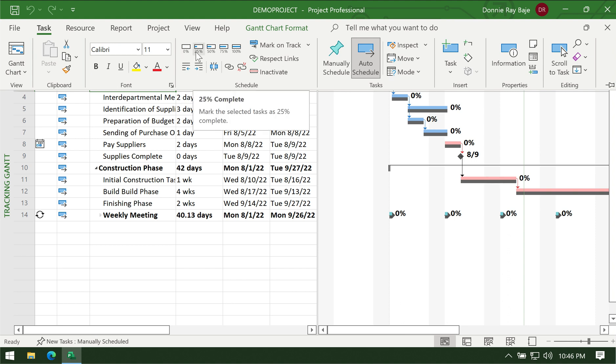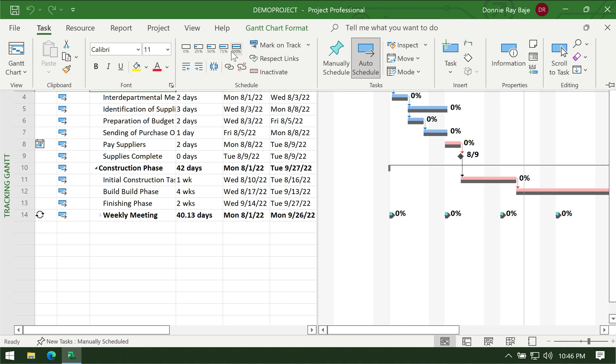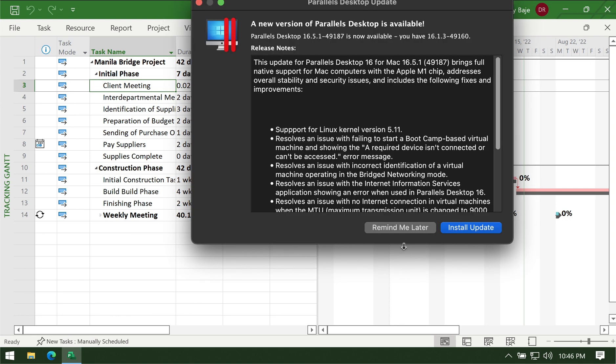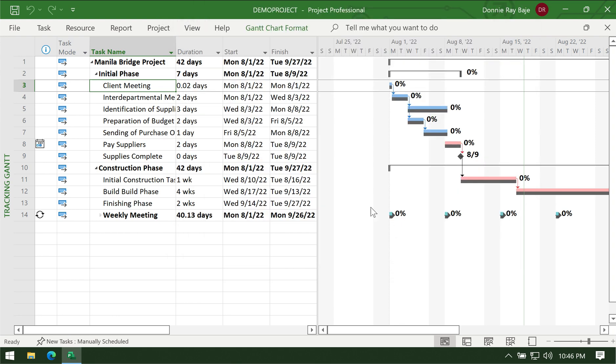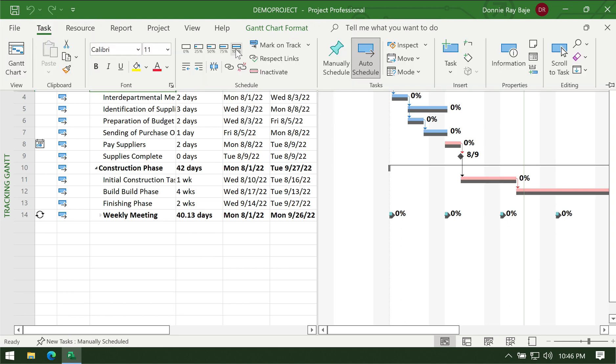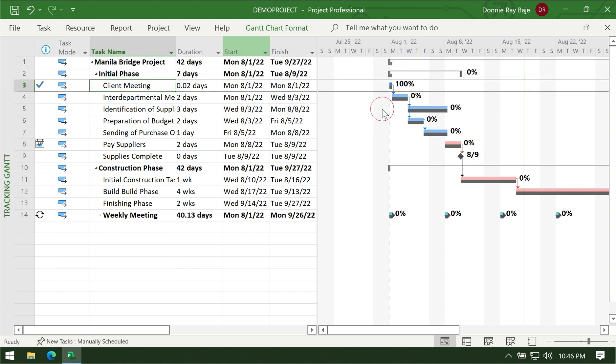The Task tab has these buttons wherein you can select the completion rate of your task. We have for example 25%, 50%, 75%, 100%. So let's say that we're going to mark the client meeting as 100% complete. We can click on that task and then click 100%.